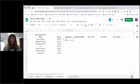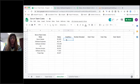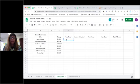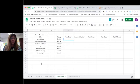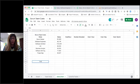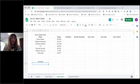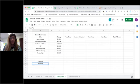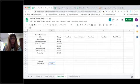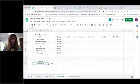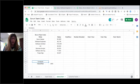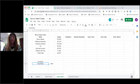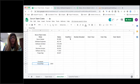So let's do the first thing here for the Scrum Master. The cost per hour is going to be based on the number of hours per year. And that's a standard 2,000 hours per year. So I'm going to put a couple of things in here as a constant. How many hours per year we have? And we know that's 2,000.